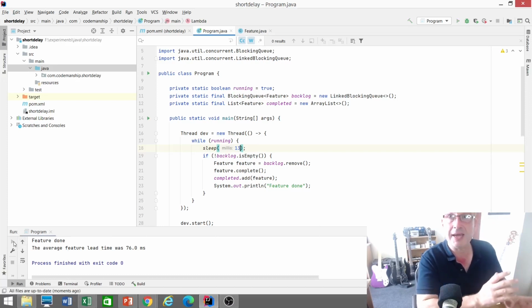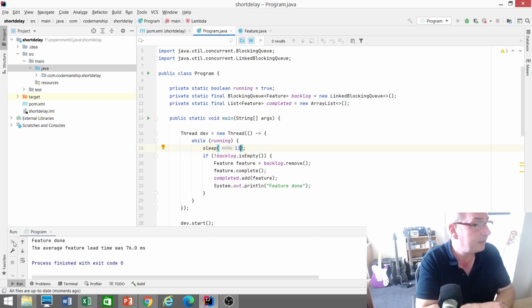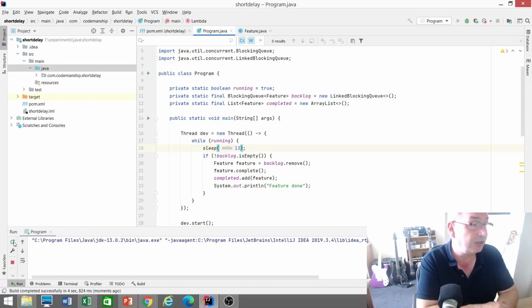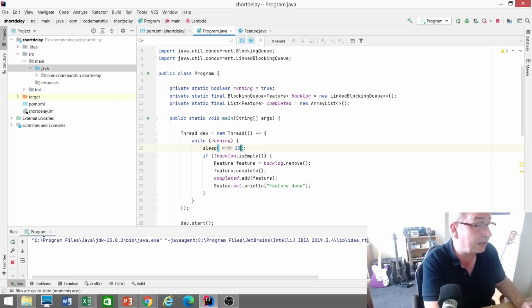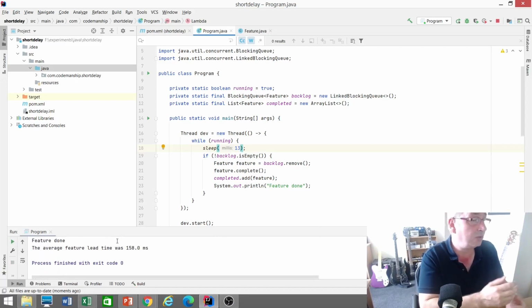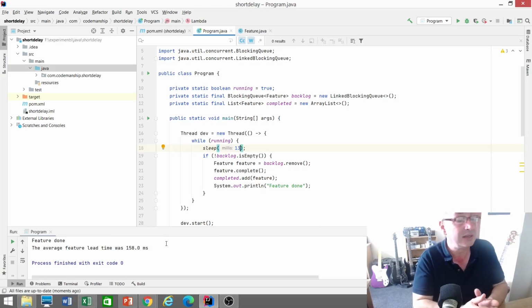So maybe that's a day and 2.5 hours. Okay, let's see what that does. Just a 30% increase in the dev time. Okay, so we're getting up into the ballpark of around 13 days, 2 weeks. Well, that's more than 2 weeks. That's 2.5 weeks. Maybe getting towards 3 weeks. 3 weeks of developer time based on a 5-day week. So from a day and a half to maybe 2.5 to 3 weeks, from a 30% increase in the dev cycle time. So small delays can cause long queues.